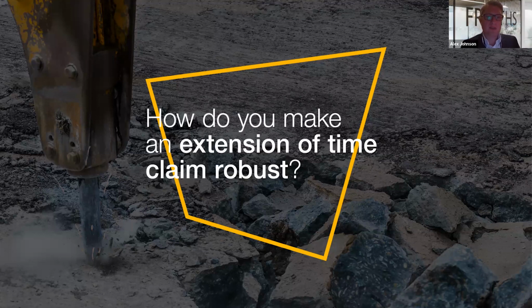An example is clause 8.5, FIDIC Yellow Book 2017, quite a common form of contract. Now, commonly these events are either things that the employer causes, such as variations to the works, or acts or omissions that hinder or prevent the contractor from carrying out the work in some way, for example, by delaying access to the site. Or they are neutral events, such as exceptionally adverse weather, changes in law, or the discovery of fossils and antiquities. I'm not sure how often that happens, but it's always an extension of time event.